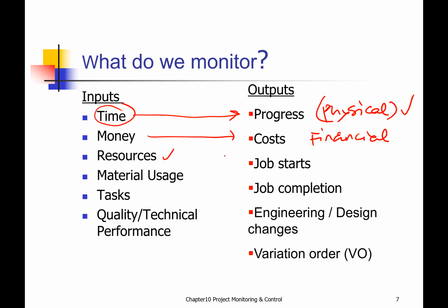When do we start the work so that we want to bring in the resources at the right timing? You do not want to bring your machinery too early or too late, just in time. You might perhaps have heard about JIT. JIT is one of the terminologies being used in manufacturing. We call it just in time. Perhaps when you are facing very limited space, especially working in the urban area, this concept could be very helpful.